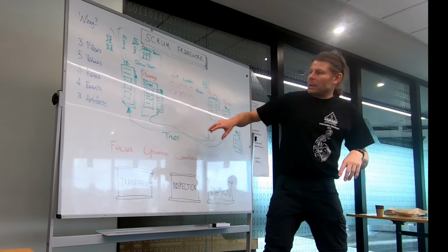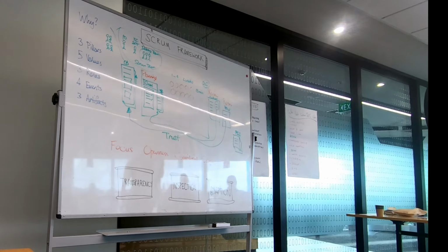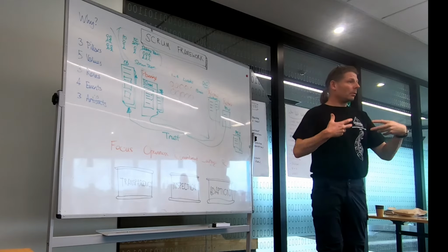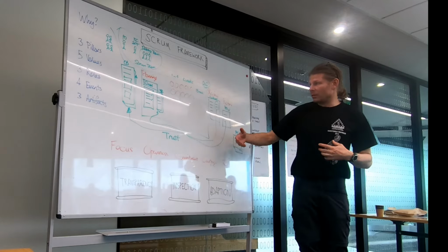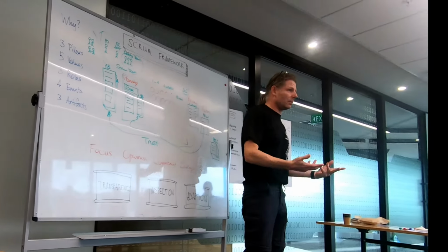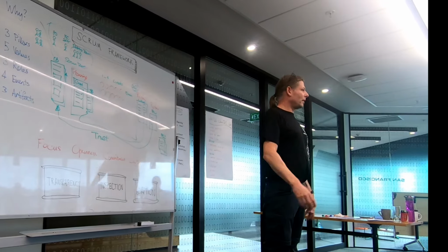Yeah, so planning is split into two parts, two topics. The first topic is what. What is it the business wants, and why as well, which is a sprint goal. That's where you pull the work in. You base it on yesterday's weather. So if in the last sprint you pulled in 40 points, this sprint probably 40, unless something's changed. So you pull in, I don't know, 8 stories or 5.8.